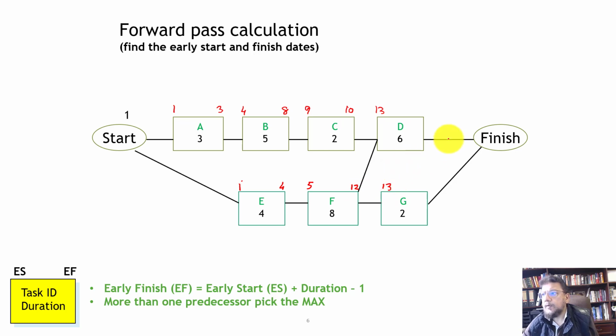And then, this becomes, that's 19 minus 1, that becomes 18. And this becomes, that would be 15 minus 1, and that becomes 14. And again, the same formula. So what is the maximum over here? The maximum is 18. But remember, now we are at a milestone. When you're at a milestone, you use the same date.